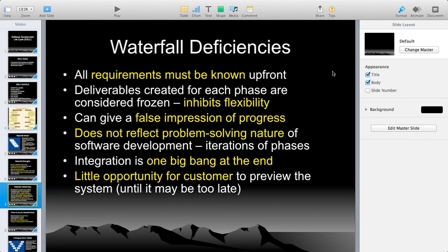Okay, so when it comes to user acceptance testing, if the client is not satisfied, the client checks that whatever requirements they had given, only those requirements are designed. If any of these requirements are missing, then we have to work on it, but not on new requirements. Let's say the client gave 100 requirements. You have to make sure that all 100 requirements are done in the project. But if you do only 90 requirements and 10 are missing, then obviously the team has to work on it, because the client already gave them in the beginning.